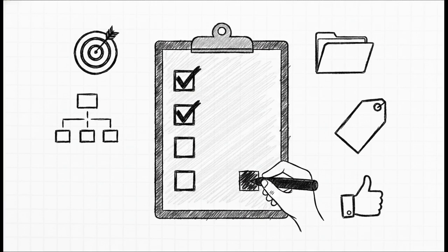Let's actually use our agenda as a final quality check before you hit submit on that handover. Number 1, are the course details, outcomes, and labels completely confirmed? 2, is the flow document 100% complete? 3, does every single item point to an exact, perfectly named file or link? 4, are your builder notes cleanly separated from the learner text? And number 5, has a project owner actually reviewed and approved the final structure?